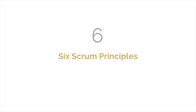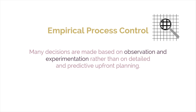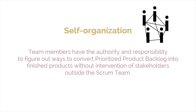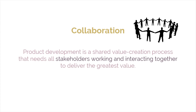The six Scrum principles include the following. Empirical process control, in which many decisions are made based on observation and experimentation rather than on detailed and predictive upfront planning. Self-organization, which implies that team members have the authority and responsibility to figure out ways to convert the prioritized product backlog into finished products without the intervention of stakeholders outside of the Scrum team. Collaboration, in which product development is a shared value creation process that needs all stakeholders working and interacting together to deliver the greatest value.